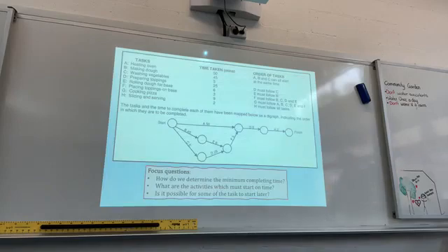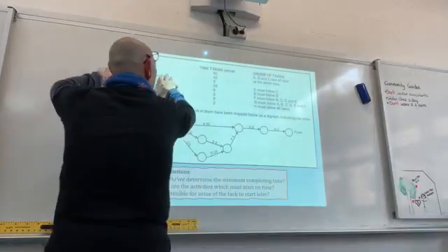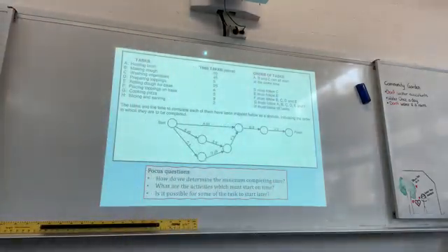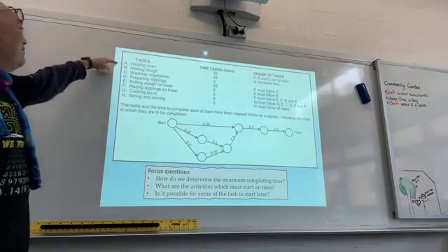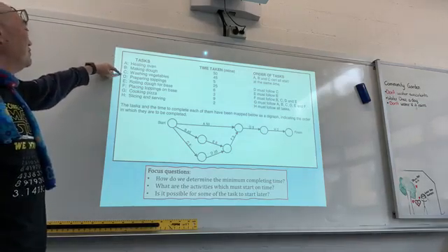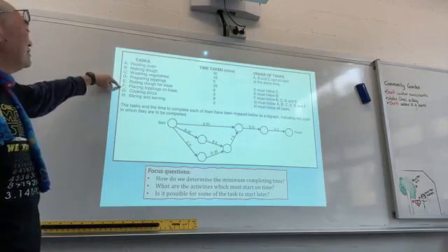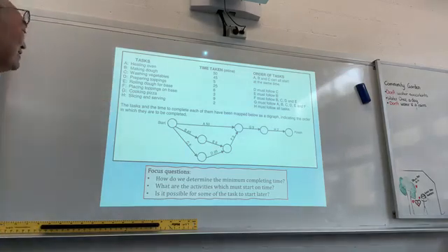Now, have a look at this. This is actually the tasks taken to cook a pizza and serve it. So you would have a task list, the time taken, and the order of the task. So for example, heating oven, making dough, washing vegetables, preparing toppings, rolling dough for base, placing toppings on base, cooking pizza, slicing and serving.